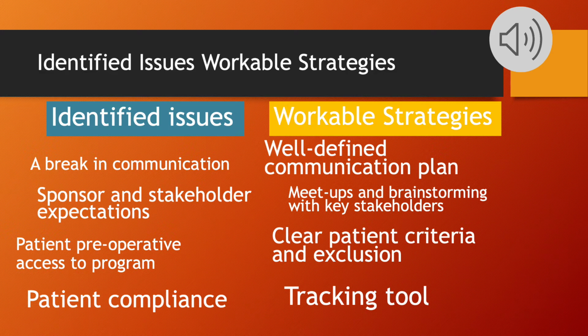Every issue that arises during the course of the project will be logged. It will have an identifier and an assigned accountable team member, and actions that have been done will be documented. And this concludes our risk management strategy. Now I will briefly discuss our evaluation process.